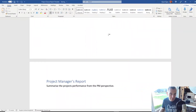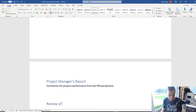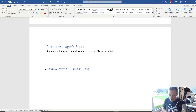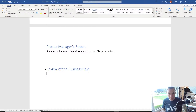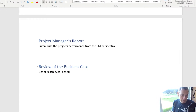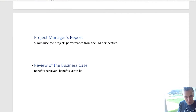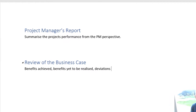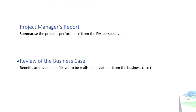If you do the project manager's report first, you might find you end up having to come back and tweak it. The next part is the Review of the Business Case. Here you might want to put some statements around whether you've delivered the expected benefits, and if there are any other benefits to be expected after the project has closed. You're doing a comparison with the original business case — this is what we expected to do, this is what we did. This will cover: benefits achieved, benefits yet to be realised, and any deviations from the business case.